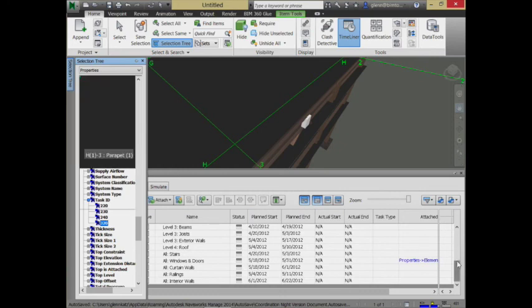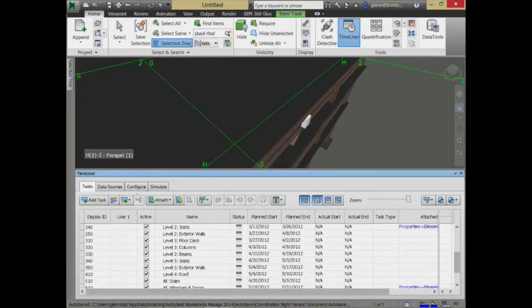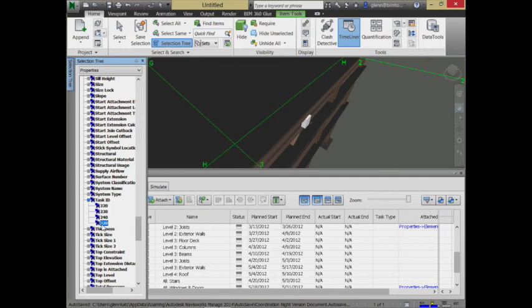It really is. Okay, but the point of all this is that once you go through and set up those search criteria and those task IDs, it becomes really, really easy. And now you have complete control. If you want to associate specific task IDs, you can do that in Revit really quickly, and just have the mapping happen over here. The nice thing is if you change one of these things in Revit, it'll always be brought in. These search sets are dynamic so that it'll always choose the things associated with that appropriate task ID and pair them up with a task.